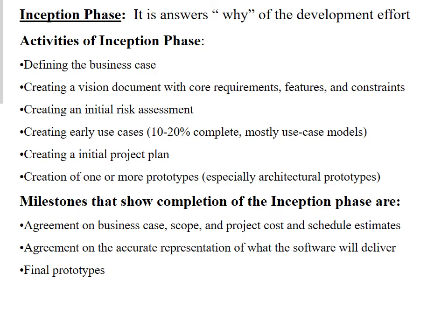If the inception phase lasts for too long, it is an indicator that the project vision and goals are not clear to the stakeholders. With no clear goals and vision, the project most likely is doomed to fail. In this scenario, it is better to take a pause at the very beginning of the project to refine the vision and goals. Otherwise, it could lead to unnecessary makeovers and schedule delays in future plans.